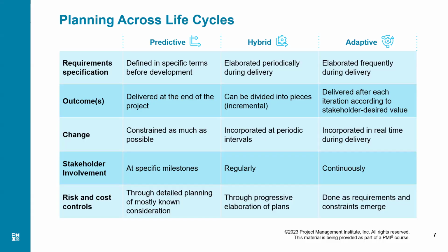On the other hand, in adaptive change, we don't have a change control procedure at all. We don't have to seek permission for change also. If the customer wants a new requirement added to the project, it can be mutually decided between the product owner and the customer, and that thing will be added to the product backlog. And whenever its turn comes, it will be picked up by the relevant iteration and they will do that job.